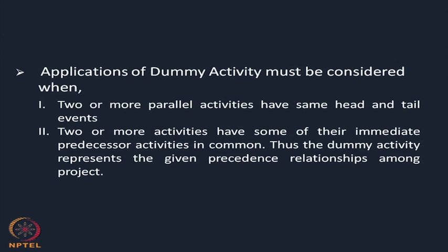This we have written here. The application of a dummy activity must be considered when two or more parallel activities have the same head and tail events. And number two, when two or more activities have the same immediate predecessor activity in common. That is, the dummy activity represents the given precedence relationship among the activities.